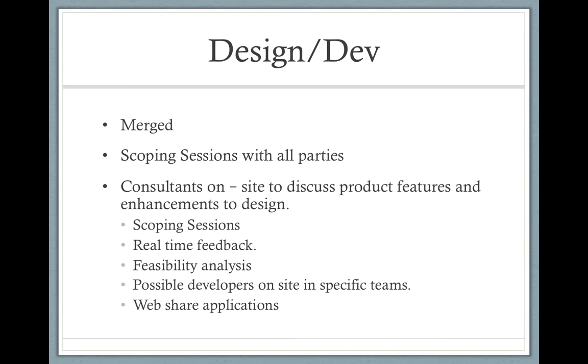This is then followed up by design sessions within the parties with solutions for the requested changes. Since the parties that will be coding are involved in the design, all concerns are addressed up front. Everyone's input is included in the design flow. This way, we avoid all the issues that I just mentioned before. The product team also provides us with support by giving a detailed overview of the product and the code, which our developers review with them. So now they can start understanding how to integrate our platform with theirs.